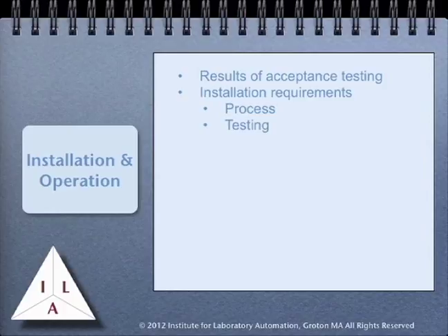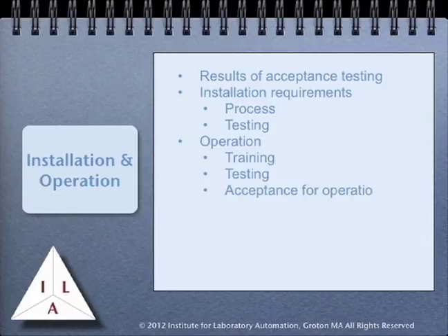The next section looks at putting the system in operation, what training is necessary, and any testing of both people and equipment, the final acceptance for operational use, and how the project is going to be phased in, and the transition that will take place between how things are being done now and how things were done with the new system. This last point is something you really need to pay attention to. It's not just a matter of putting a new system into operation, but how do you transition between one way of doing work and another?